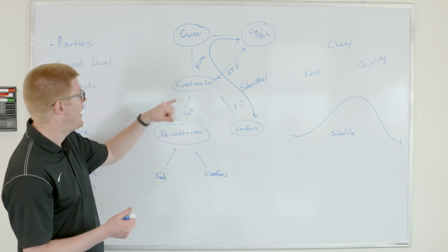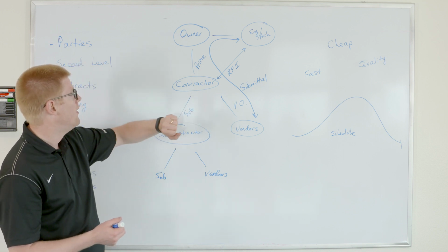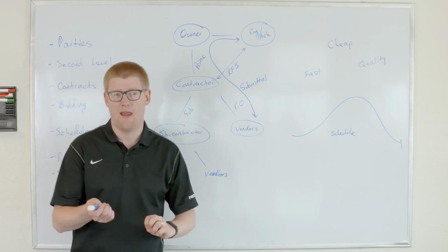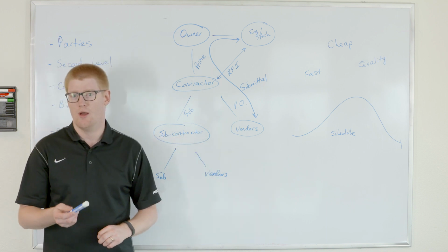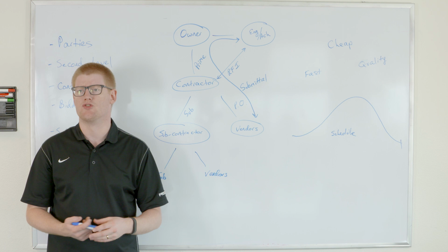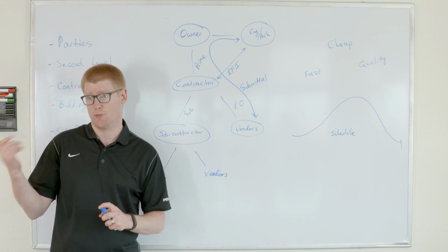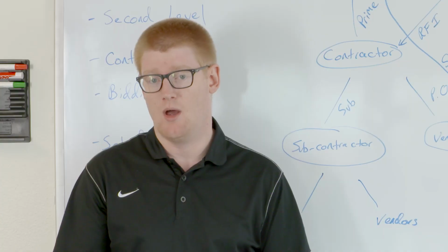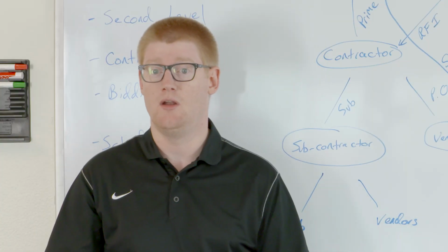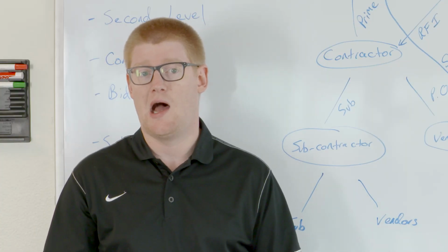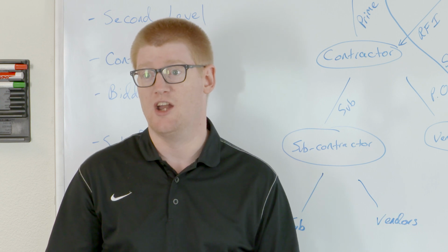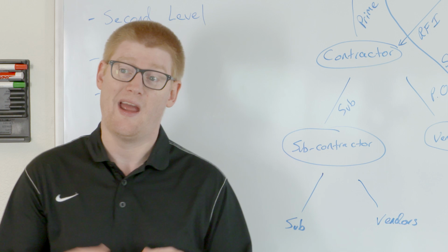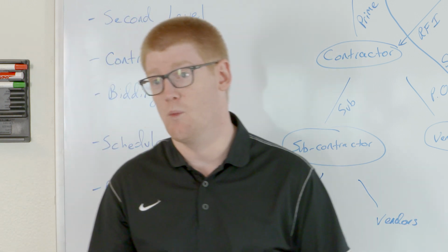So change orders can happen along any one of these contracts, even along purchase orders in Procore, as we really handle large purchase orders. There's kind of two types of purchase orders on a job site. There are the, I'm gonna run down to the hardware store and buy a pack of bolts for 20 bucks and cut a PO, which you do hundreds of on a job site. And there's also the, I'm gonna buy my rebar on the job site and it's a $110,000 purchase order. Procore handles those large purchase orders very, very well.